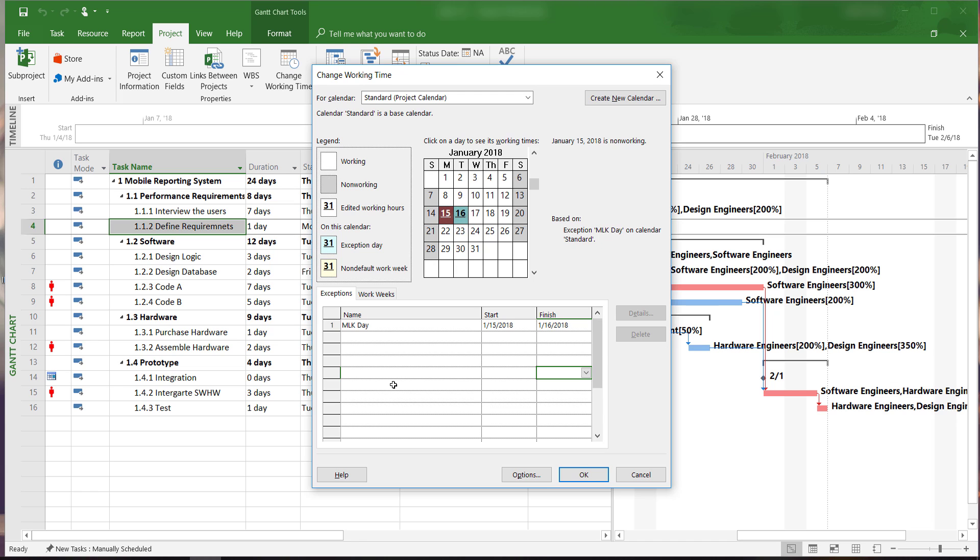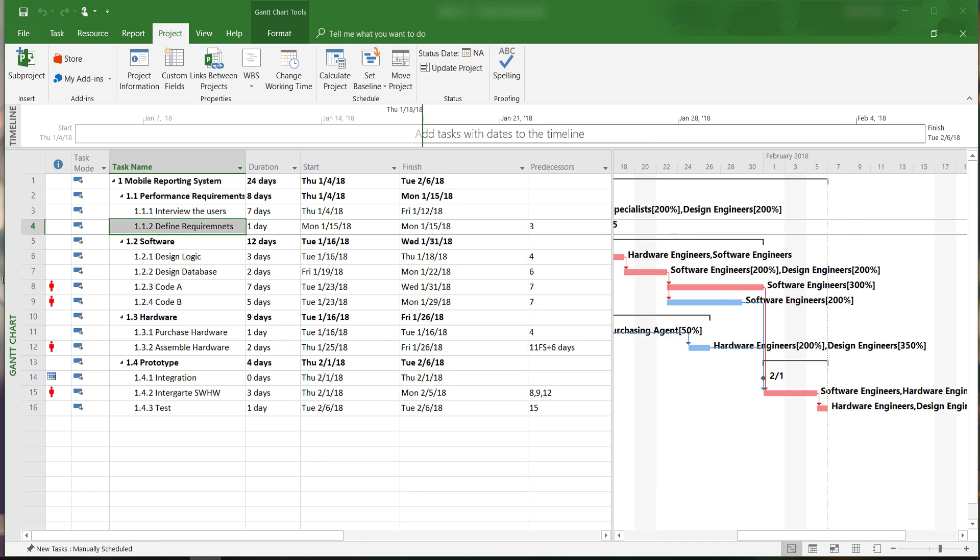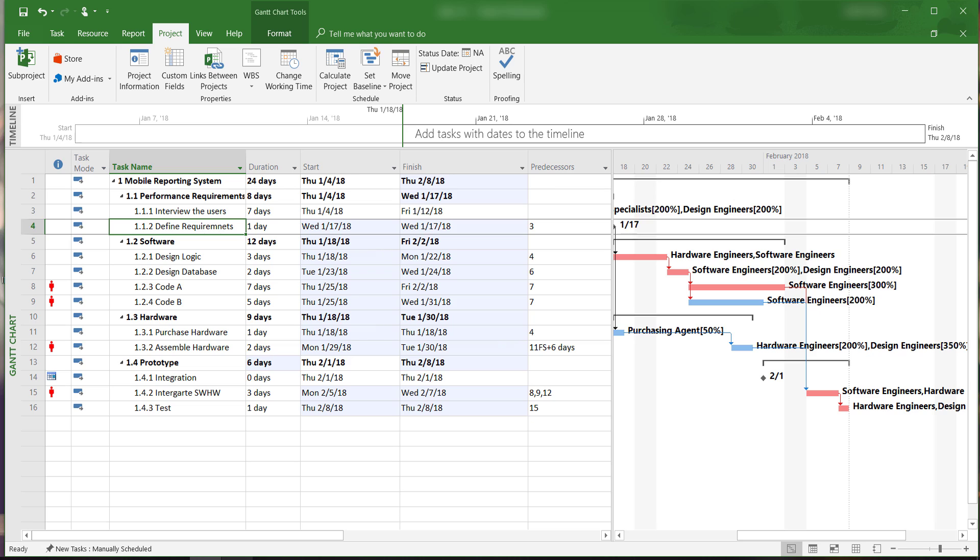Holidays and other non-working days within the schedule will not increase the number of working days, but they will extend the completion date of our project.